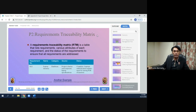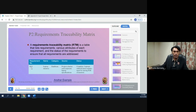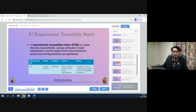A requirements traceability matrix (RTM) is a table that lists requirements, various attributes of each requirement, and the status of the requirements, to ensure that all requirements are addressed. For example, requirement number R32, named 'Laptop Memory,' category: hardware, source: project charter and corporate laptop specifications, status: complete — laptops meet the requirement by having four gigabytes of memory.